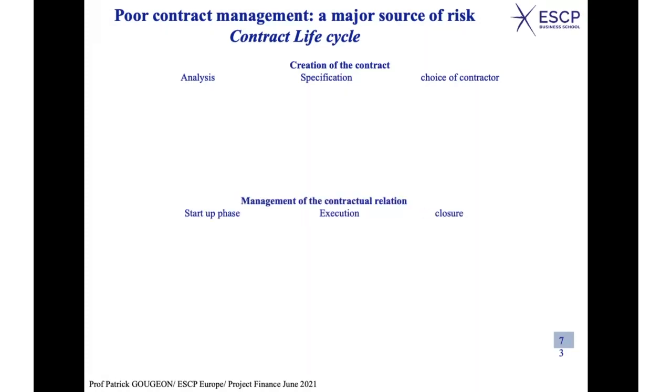So if you have a project, you have a project company, and you need to remember to outsource the risk, putting together all types of participants around the project company. So for each of the participants, for each contract you're going to sign, you need to know why you have this contract.